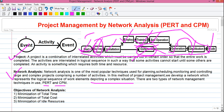Let's say you are one of three executives of a company who will fly to London from New York for a project survey. Until all three reach the site and complete the survey, the project cannot be started. When you start your journey from New York, that point is an event. When you finish your journey to London, that point is also an event. Your journey from New York to London is an activity.